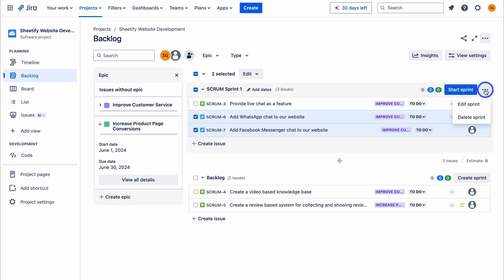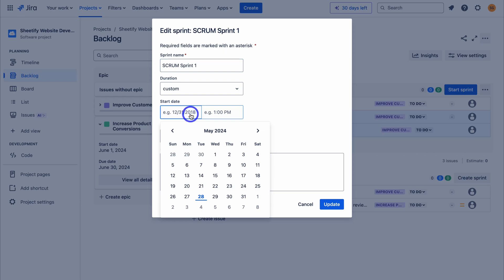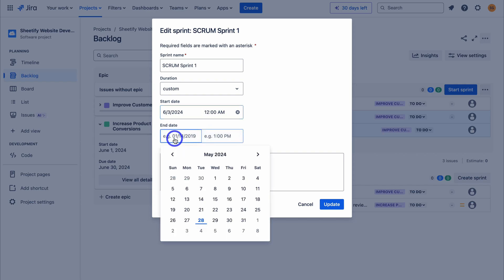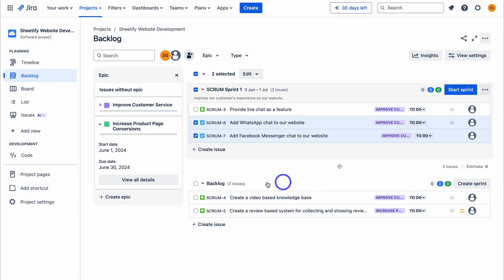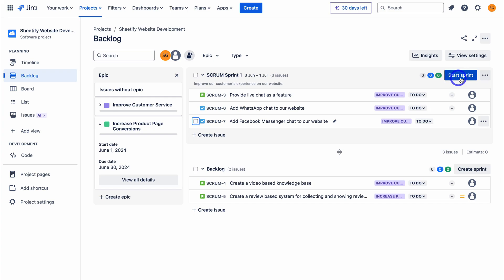Navigate over to the three dots and click on edit sprint. A sprint is a specific time frame to complete a set amount of work — typically the time period is one month or less. I'm happy with the sprint name. Under duration, I'll select custom, then set the start date to Monday the 3rd of June and the end date to the 1st of July. Then you can add the sprint goal — in our case, this is all about improving our customers' experience on our website. Navigate down to update. Now we have a backlog of work items and our sprint that starts next month. When you're ready to start the sprint, simply click on start sprint.